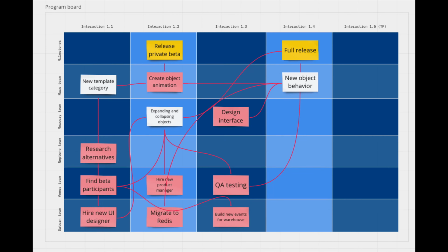You'll say, okay, before this functionality can be delivered, we are dependent on that team to do this piece of work. So you take a different color sticky on your Miro board and put that in. Now you, with your product owner and with your team, have looked at the epics you're going to be working on in the next 4 to 5 sprints. You have also seen what the dependencies are. Now you want to approach the other teams to discuss those dependencies.